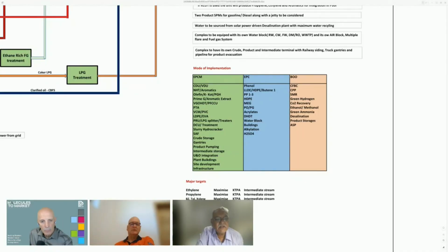So whether the cost goes up or down, the problem remains only between the owner and consultant. But a contractor who is going to commit himself on a particular contract will put a price tag on the risk they are taking, because there are penalties if they don't do it in time. So somebody has to load those penalties.